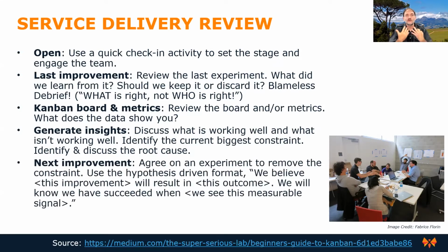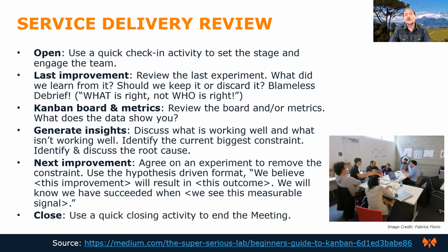Having done that, we can now say, okay, what experiment and what one experiment are we going to run in the next week or two until the next service delivery review? And very importantly, and a highly suggested way, is to run it in a hypothesis-driven format. And anybody listening to me would have heard that quite often already. In this, we believe this improvement will result in that outcome, and we know we have succeeded when we see the following measurable result. And lastly, we should have a standardized close.